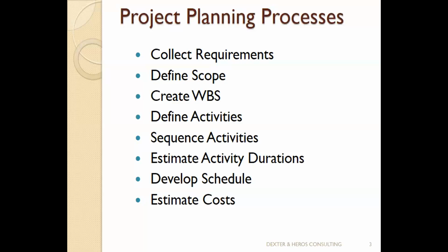That's what we call define scope. So that is the second thing we do in planning. When I define scope, please, the word define simply means write it out. Meaning write out the works you're going to do. At the end of the day, I have a document containing the work that I'm going to do from beginning to the end of the project. One thing that will be in my mind is, am I sure this thing is complete? That's the next thing that will be in my mind.